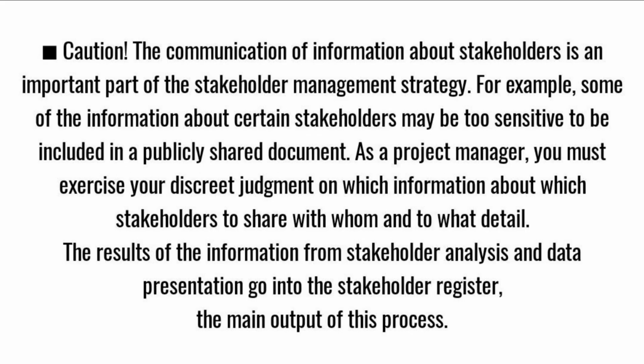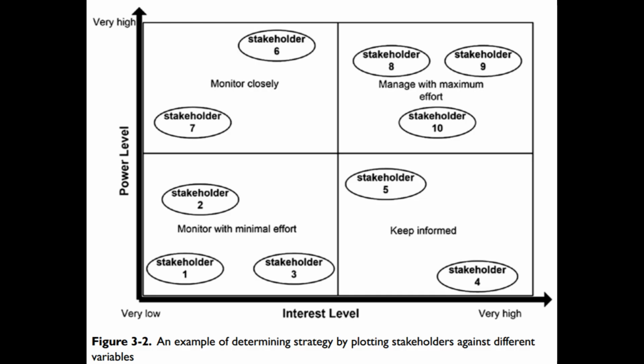Caution! The communication of information about stakeholders is an important part of the stakeholder management strategy. For example, some of the information about certain stakeholders may be too sensitive to be included in a publicly shared document. As a project manager, you must exercise your discreet judgment on which information about which stakeholders to share with whom and to what detail. The results of the information from stakeholder analysis and data presentation go into the stakeholder register, the main output of this process.